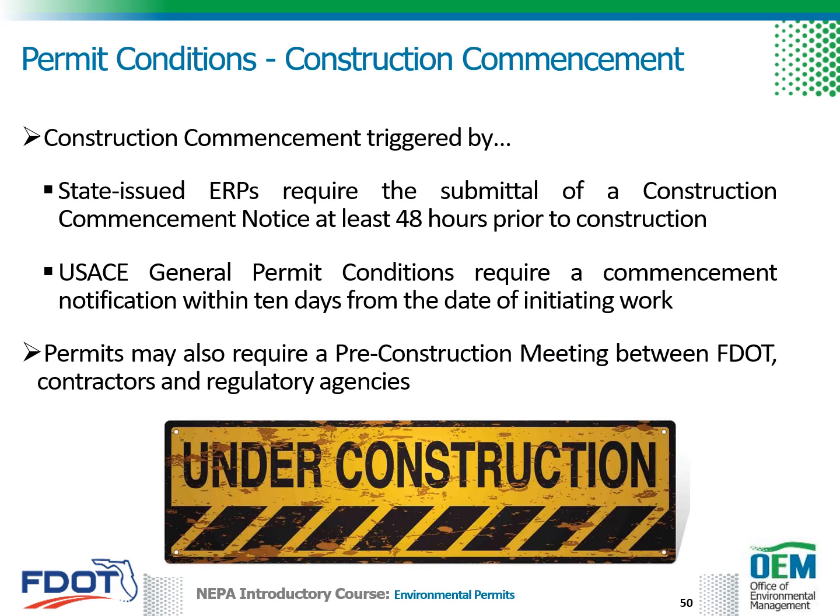The timeframe immediately prior to the start of construction is a crucial stage in project compliance and requires an understanding of what is not authorized by the permit. These construction commencement conditions include any requirements triggered by the start of construction. State-issued ERPs require the submittal of a construction commencement notice at least 48 hours prior to construction. This is typically done by the contractor with oversight from the CEI.